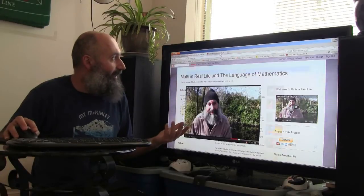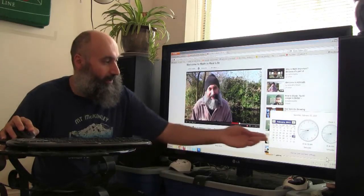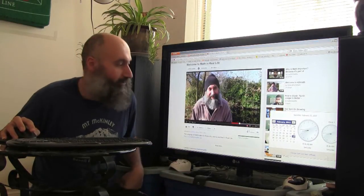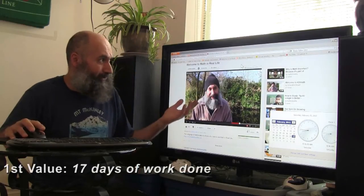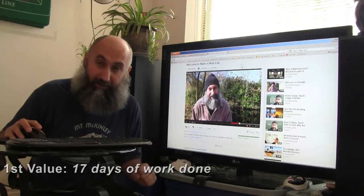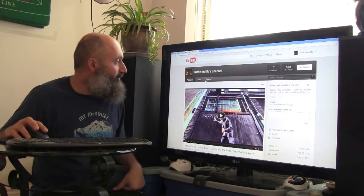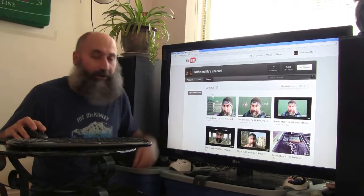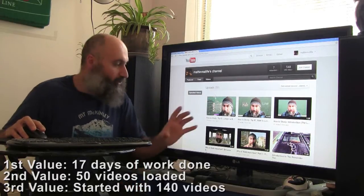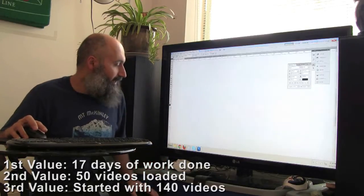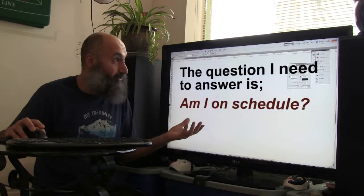I loaded that video up on February 8th, and right now we're sitting on February 25th — so it's been about 17 days. Since that time, if I go to my YouTube channel, I've loaded up 50 videos. I needed to load up 140 videos total. So let's do a little calculation and try to figure out if I'm on schedule.